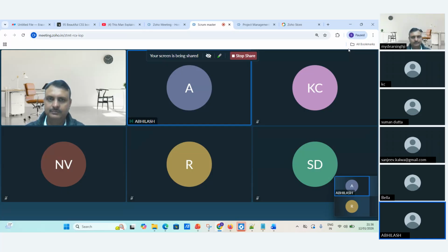As we need to deliver in small iterations, the business, stakeholders and developers stay aligned with whatever is going on in the market. For example, if there are 3 iterations and we have delivered the third iteration, we will have the sprint review with the business. It is done every sprint, but on the third review, we'll definitely ask, are we aligned with the market? Because at the end of the day, we are delivering to the market and we need to align with it. So Agile is this way.